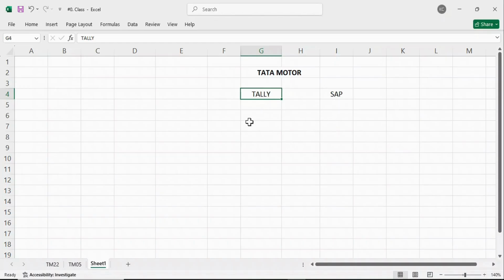Don't say Tally, Oracle or something. Instead of Tally, there could be another ERP also, right? So in cut over activity, the data will be migrated from the legacy system to the SAP system. This is what you have to explain. Cut over activity is a data migration activity, and here we migrate the data from the legacy system to the SAP system. Generally, this cut over activity happens in the last phase only.